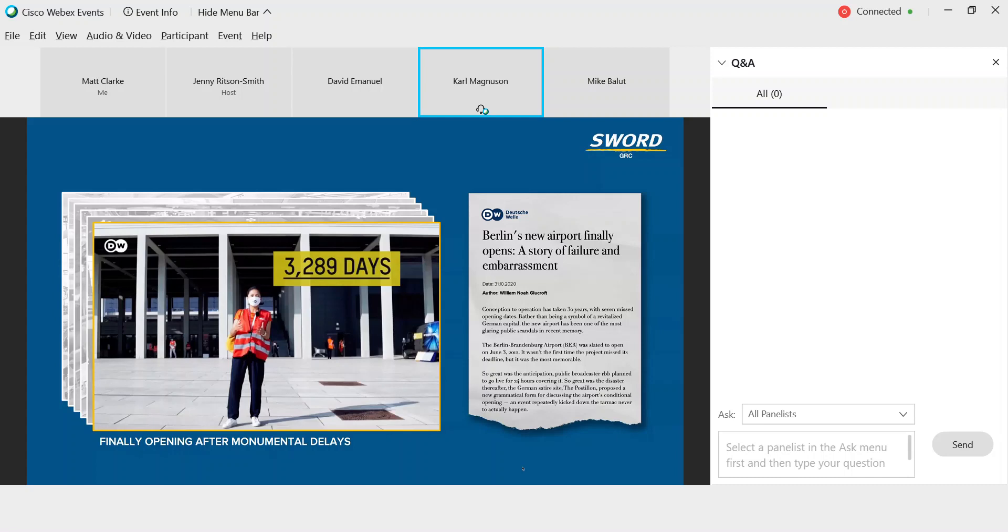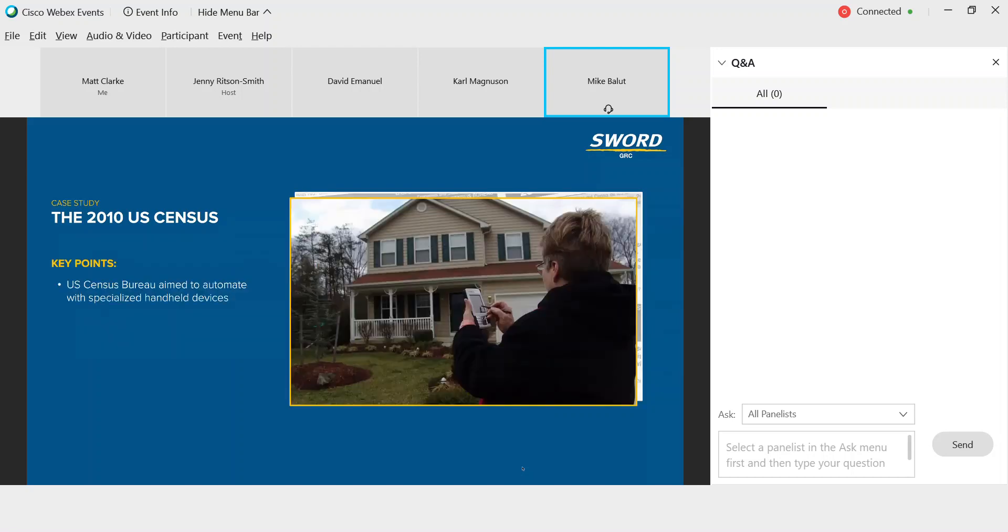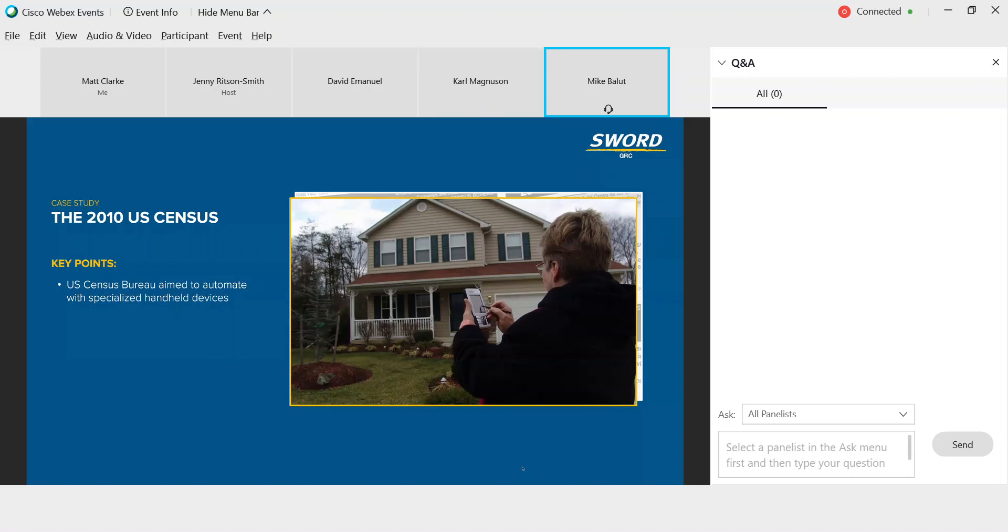Well, all of the airport projects were intended to create something new to better serve their communities. What happens when the primary reason for the project is simply to reduce costs, such as using automation to increase productivity? For example, as part of the 2010 census preparations, the U.S. Census Bureau launched a project to use specialized handheld devices in the field, primarily to automate address canvassing and to update maps with GPS. The timing of some key activities quickly put the project on the path towards failure. The first draft of user-validated requirements for the handhelds wasn't delivered until two years after the contract had been awarded.